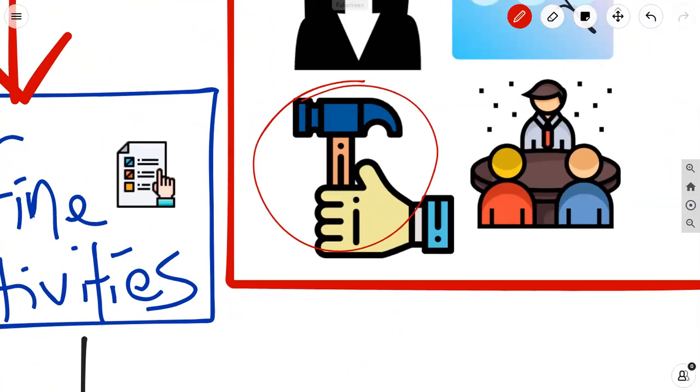Decomposition, it says, is a technique used for dividing and subdividing the project scope and project deliverables into smaller, more manageable parts. Activities represent the effort needed to complete a work package. The Define Activities process defines the final outputs as activities rather than deliverables, as done in the Create WBS process. The activity list, WBS, and WBS dictionary can be developed either sequentially or concurrently, and the WBS and WBS dictionary use as the basis for development of the final activity list.